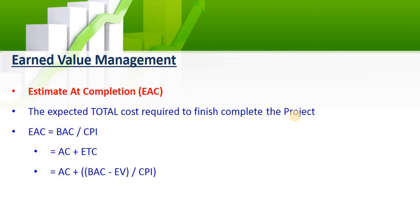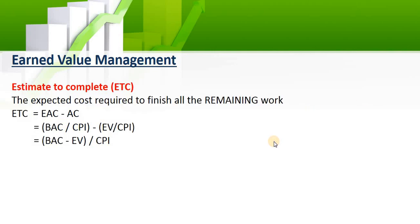Estimate at Complete (EAC) can be calculated in different ways: either as budget at complete divided by the CPI, or as actual cost so far plus the ETC (Estimate to Complete). ETC is the amount of work required to complete the project from your data date to the end of the project. It equals Estimate at Complete minus actual cost, or you can use the other equation shown on screen.